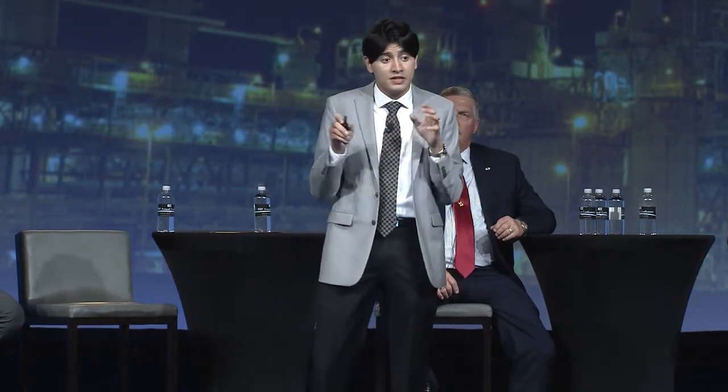And this is just an example to give you a feel of it. In this figure, the y-axis shows the productivity index in terms of earned over actual. And the x-axis shows the percentage of total hours spent performing out-of-sequence. And from the blue line, you can clearly see the strong inverse relationship between productivity and out-of-sequence, which means that as out-of-sequence increases, productivity decreases in a statistically significant way.